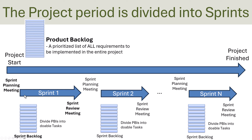They work with these items in the sprint. At the beginning of the sprint they have a sprint planning meeting where they pick out items from the product backlog and start working on them. When the sprint is finished, they have a sprint review meeting where the team comes together and demonstrates the parts that have been done. When that sprint is finished, they have a new sprint planning meeting and start on a new sprint. That's the whole process of working with sprints in Scrum.